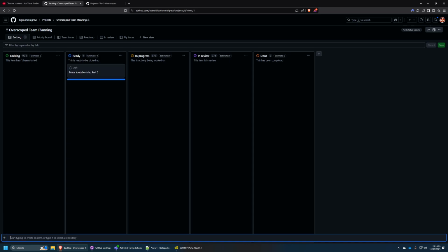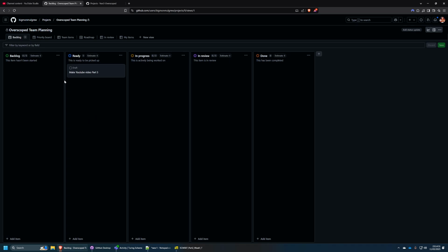So I'm going to go down to the bottom and click add item, make YouTube video part 5. So you can argue interpretation of these amongst your team, but to me, ready means anyone on the team can come along and pick this up. Backlog means we are deliberately excluding this until other things in the ready list are done.